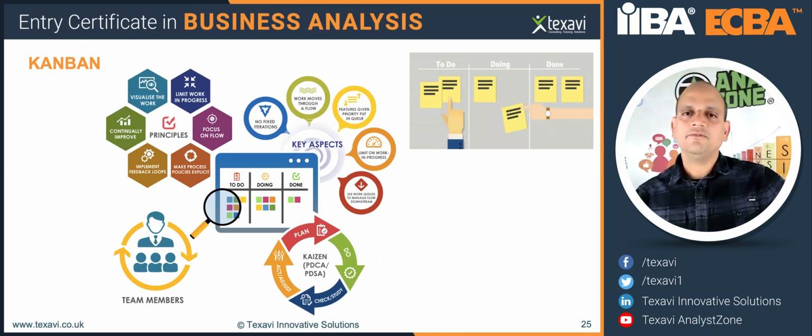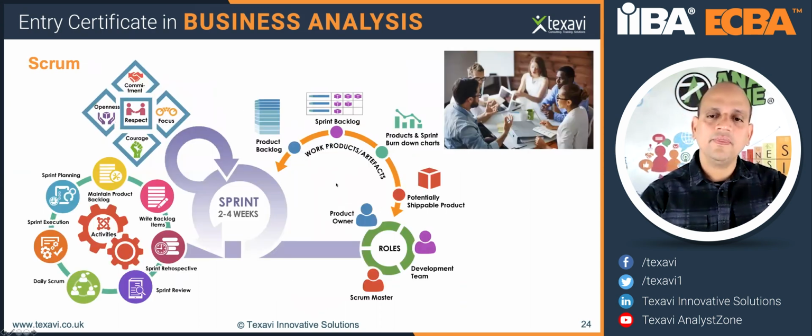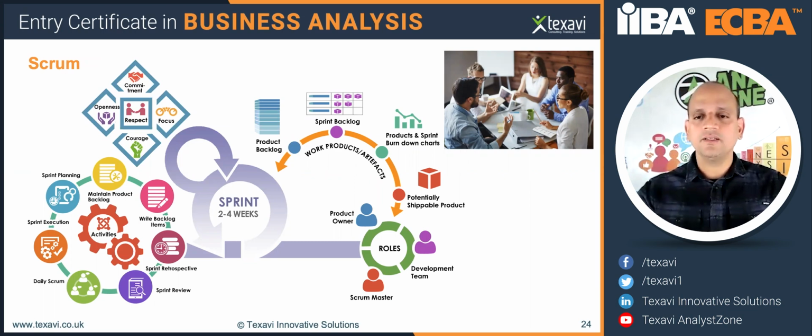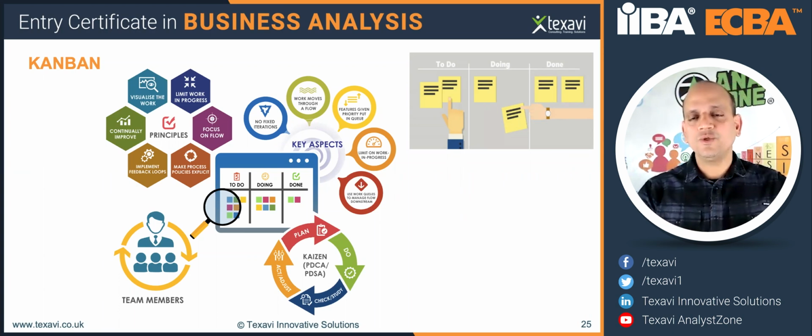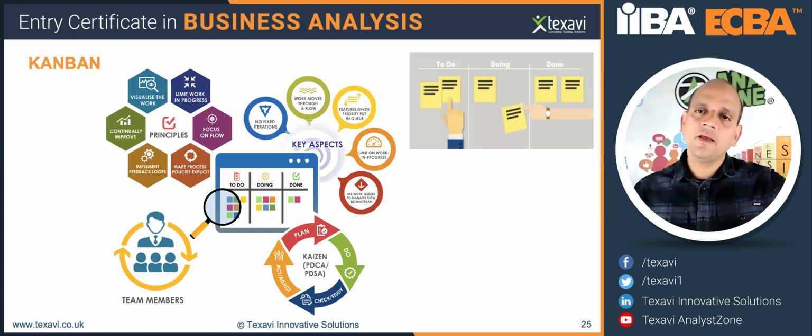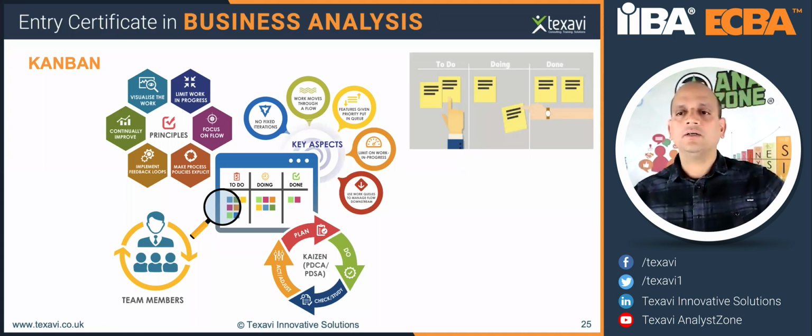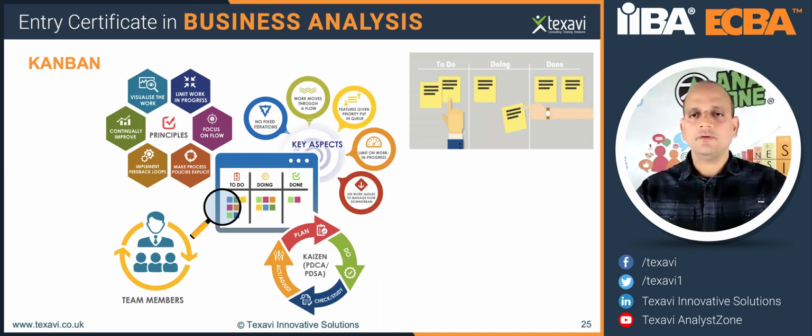So this is a process, and Scrum wouldn't fit there, because you don't have product releases and things like that to be developed, unless you have a solid product there to address that process. Then you can use Scrum. But if you have a process just like that, then it's better to follow Kanban, because you can clearly see the movement of the work across these different streams. That's why you use Kanban when it's involving processes or workflows.